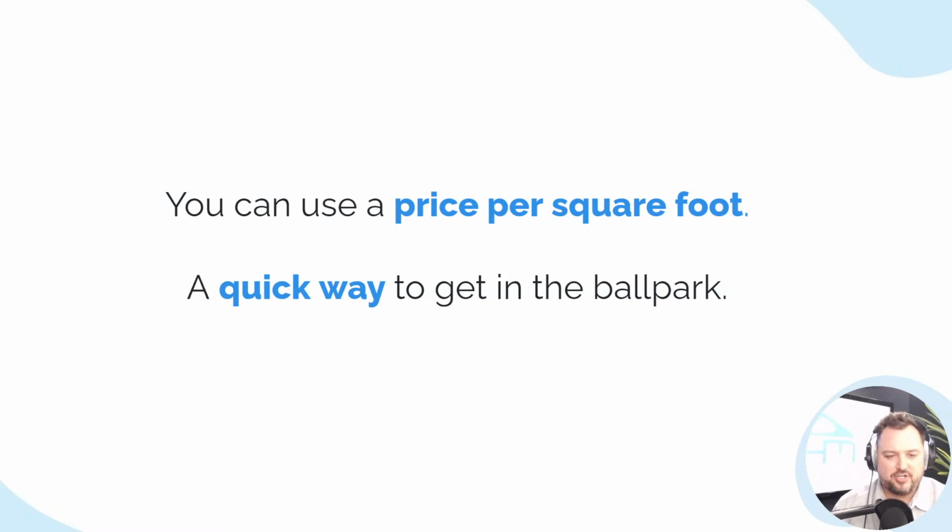What I'm going to teach you to do is if the property is 1,000 square feet, the entire property, times that by the dollar amount and use that. It's so much simpler because you don't have to go measure every single room. And some are going to be too high and some are going to be too low. But in the end, you're going to get to this quick and dirty ballpark so you can make more offers.